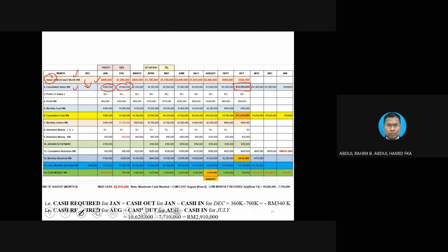Third row, profit. Why do we put profit inside there? Because we want to calculate costs based on this formula: V equivalent to C plus P. And when we want to calculate cost, C equivalent to V minus P, isn't it? So that's why we show you step by step. But in reality, you can skip, because once you understand the concept, C is equivalent to V times one minus the profit percentage, and in terms of the mathematical formula, you get exactly the same.